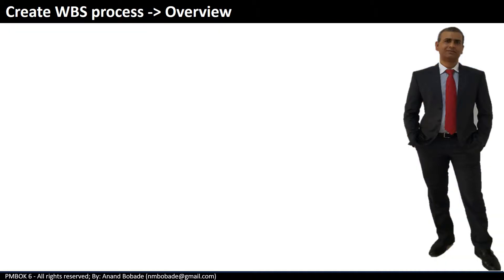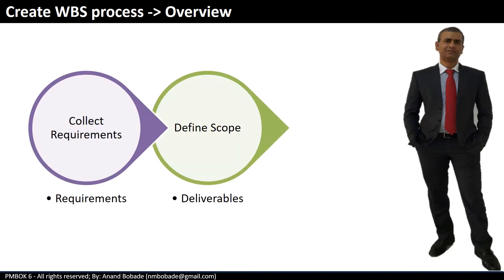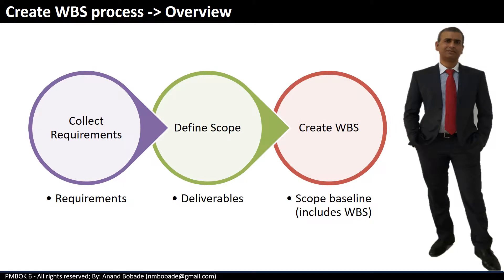In a previous session we saw two processes — collect requirements and define scope — before we create the WBS process. What is the relationship of requirements, deliverables and WBS, which are outputs of these three processes? Requirements are input to build the deliverables. Deliverables will be listed in the project scope document, which is the output of the define scope process. These deliverables will be divided and subdivided into smaller, more manageable packages, which results in the WBS.